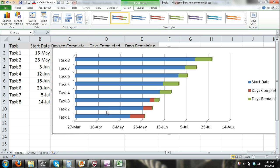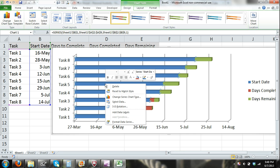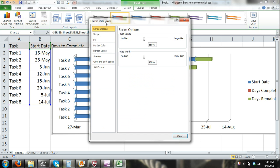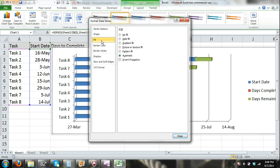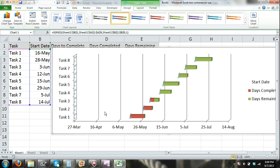The first thing I'm going to do is get rid of the bars that represent the Start Date, because before the start date there's nothing going on — we don't need to see any bars representing that. I'm going to click on the blue bars to select them all, right-click, and select Format Data Series. In the Format Data Series dialog box, I'm going to select Fill, check the No Fill option, and close. So I haven't deleted those bars — I've just hidden them.